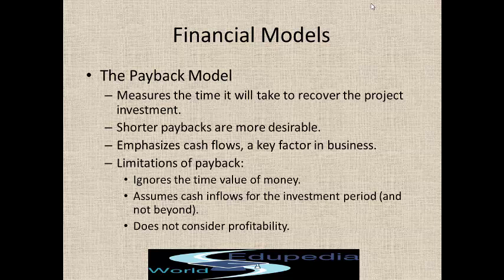The limitations of payback are that it ignores the time value of money, because 1 crore today may be 1 crore 20 lakhs after 3 or 4 years. So it ignores the time value of money. Also, it assumes cash inflows for the investment period, and it doesn't consider profitability.